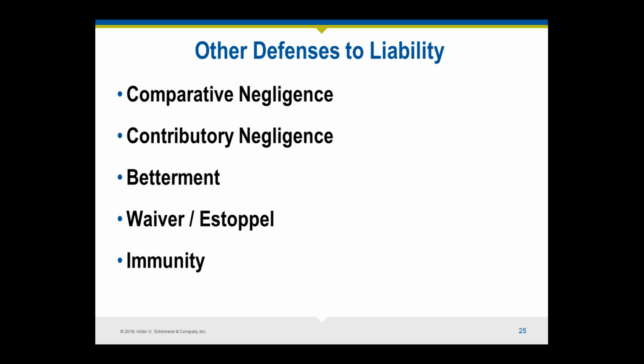Another example of immunity might be that if your agreement says that you're the decider of disputes between the client and the construction contractor during the construction phase, for example, the AIA and the EJCDC documents give you immunity from decisions that are made in good faith. So you might want to have that kind of immunity in your contract as well.